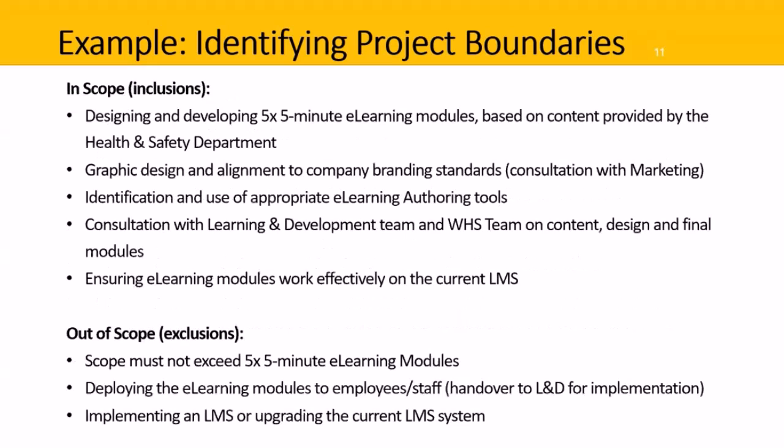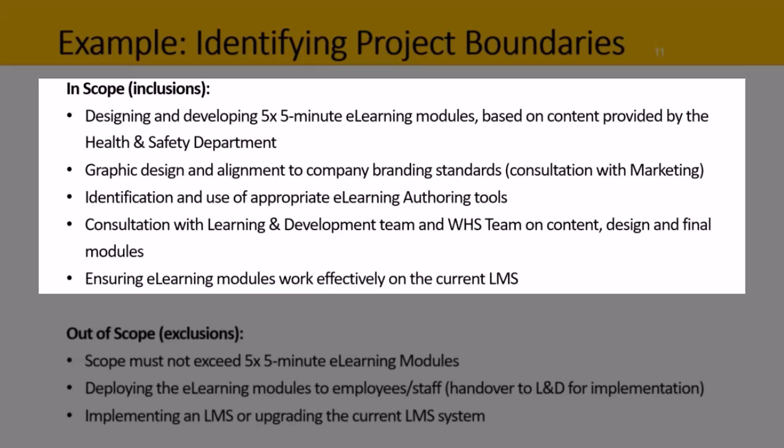In consulting with the stakeholders, we also have these ones. In scope, or the inclusions, are designing and developing lots of 5-minute e-learning modules based on content provided by the Health and Safety Department. Graphic design and alignment to company branding standards are included. So we got that from marketing.